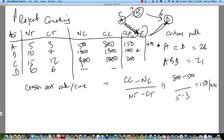Everything shifts by two days. So really, relatively speaking, if I cross that out now and reduce it by two, the paths are now two and ten and eighteen. Next, the path is now eighteen. It's going down to eighteen. And this one, we crashed it, I think, what was it, by two days? So the relative advantage, there's no relative advantage here. The next one to then crash now is C.